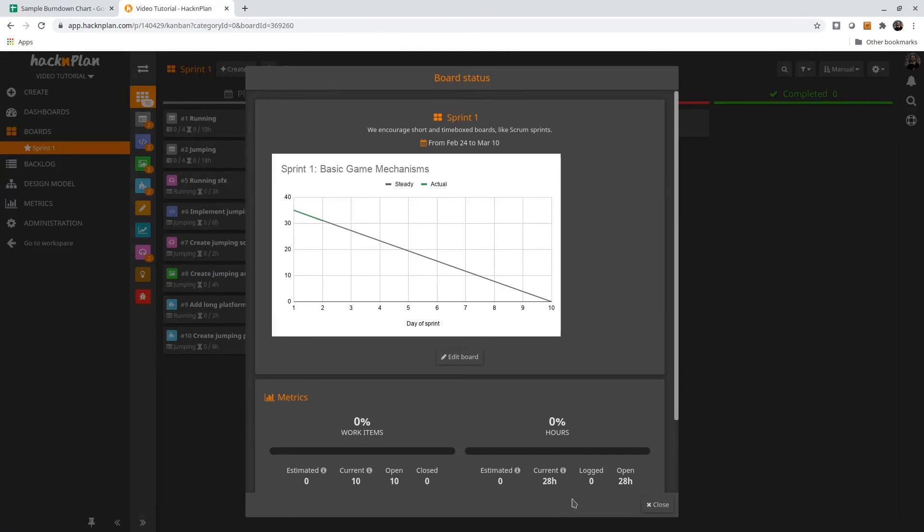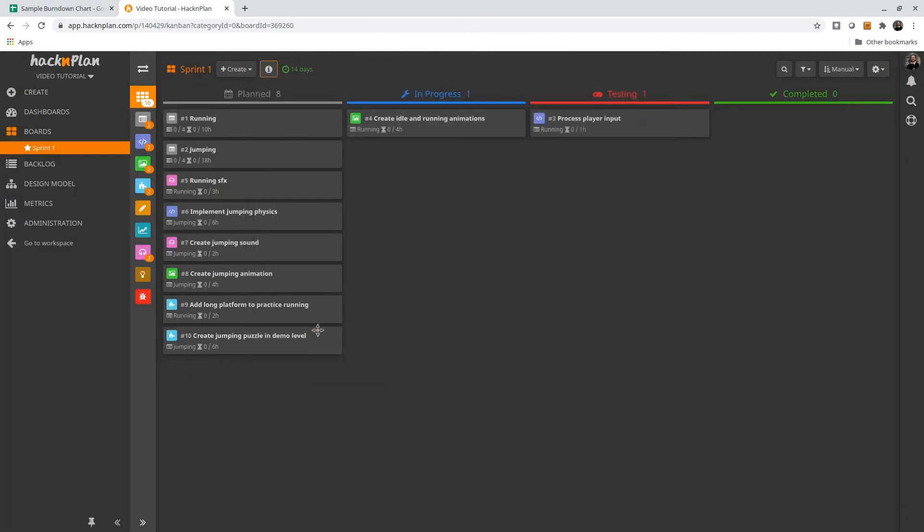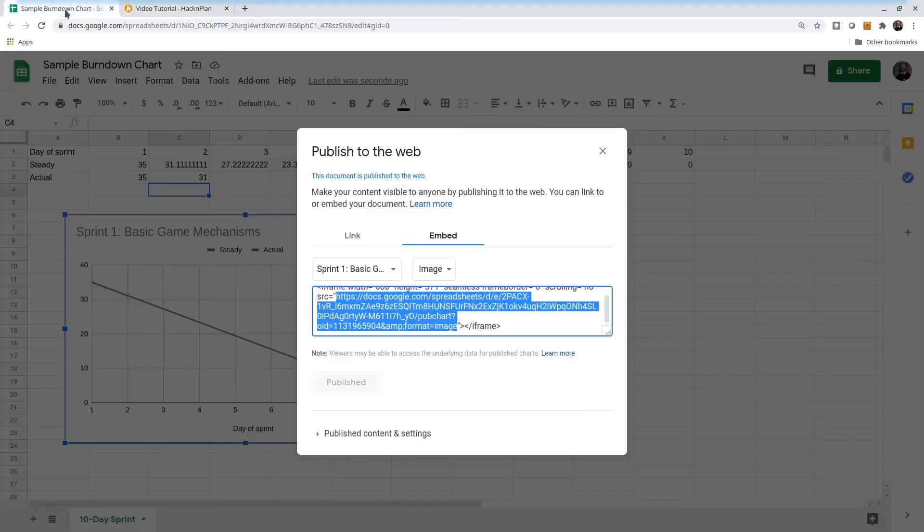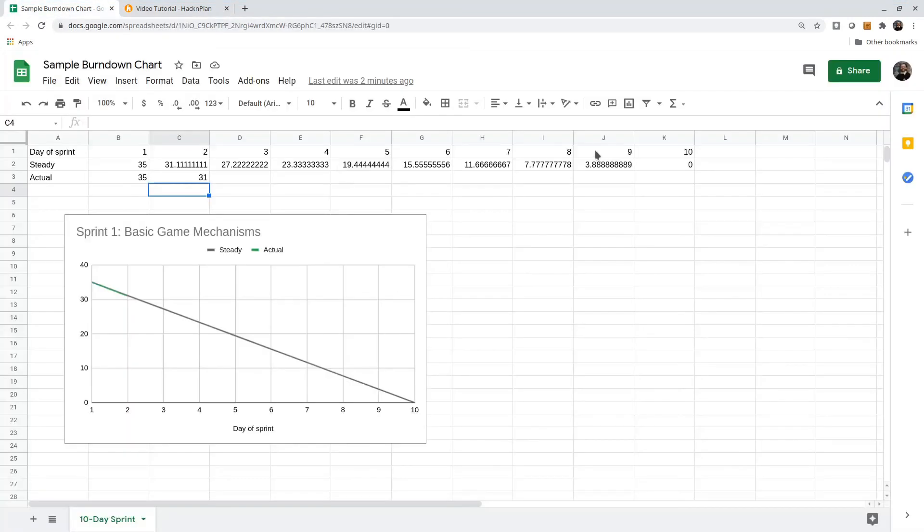I can see now there's 28 hours left on the project. So if it's the end of the workday, I can go back to my burndown chart and say now we have 28 hours remaining. We can see the green line going up to the end of day three here.